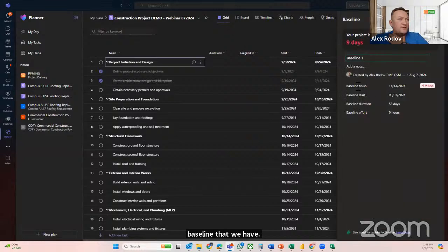Yeah, so now the baseline finish is 9 days. Your project is behind schedule by 9 days. So that's kind of allowing you to baseline this in the beginning and see how late you're becoming by changing some of these tasks.